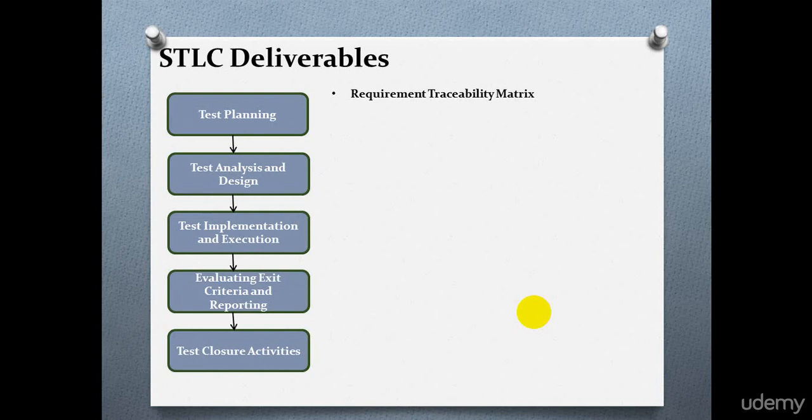During the test planning phase, each requirement is mapped as testable and non-testable requirements, and a requirement traceability matrix is prepared. Traceability matrix links a business requirement to its corresponding functional requirement. It also helps us to ensure that all the requirements are tested. Automation feasibility for the given testing project is also done in this phase only.